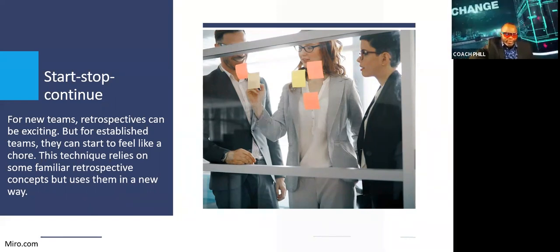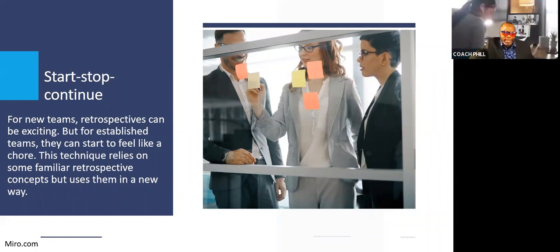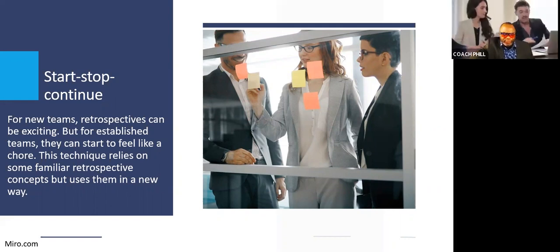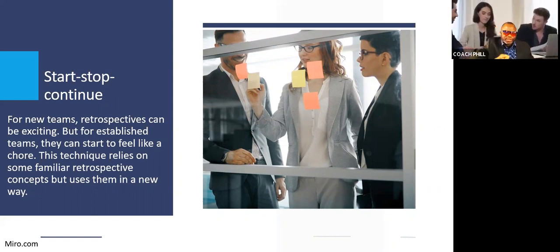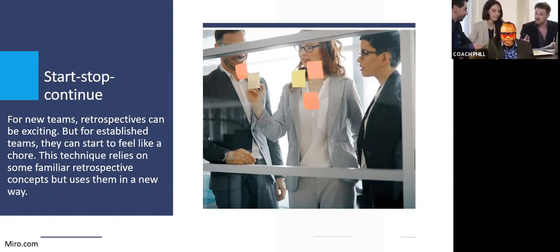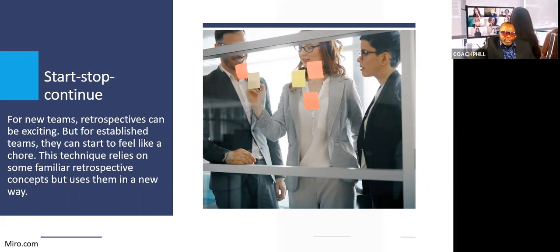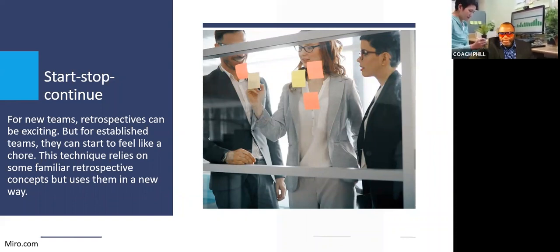Let's talk about the last one here. The last one here is start, stop, continue. Start, stop, continue, as I have made allusions to before, is about making it fun and sucking the team in to give even more, because this is a time box of about 1.5 to 2 hours, right? So together you can, with the team, take it up a notch to the next level and review your latest sprint, identify actions that you should start doing, stop doing, and continue doing in future sprints.